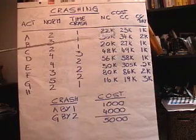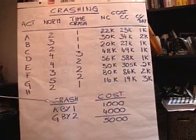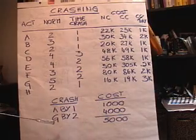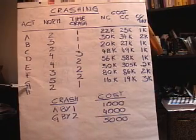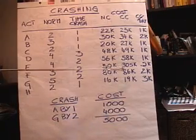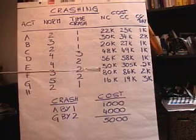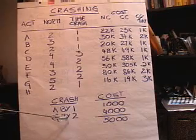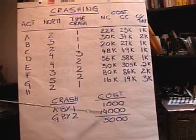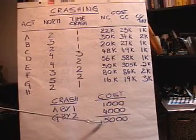Activity A is cheap at $1,000 per day, so let's crash A by one day. That gets us from 15 down to 14 at a cost of $1,000. But we want to get it down to 12, so let's crash G by two days at $2,000 per day. We can crash G by up to three days, but two is sufficient. We couldn't crash A anymore — that was already done. That's an extra $4,000, bringing the total additional cost to $5,000 to get from 15 down to 12.